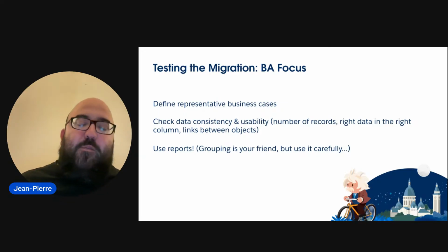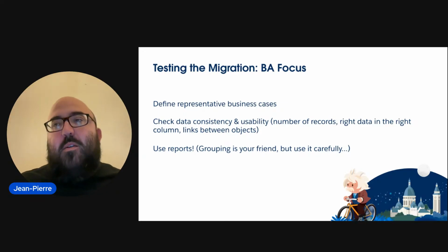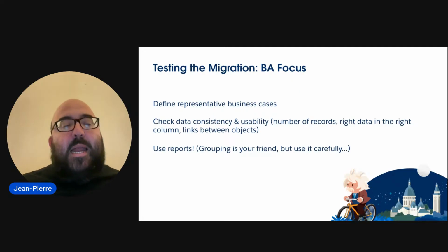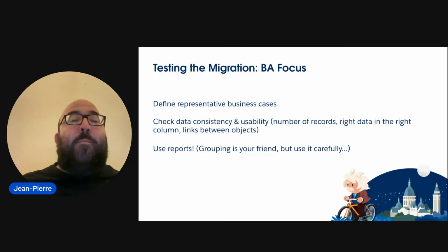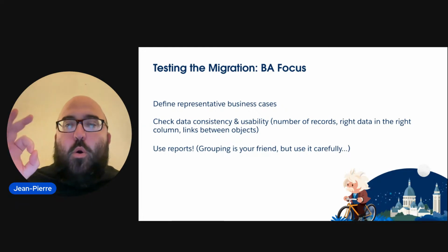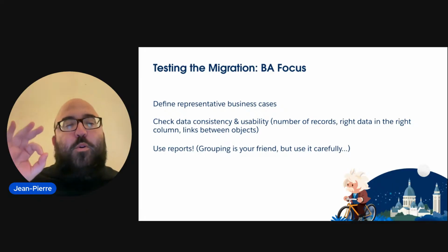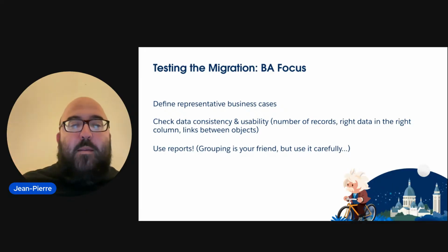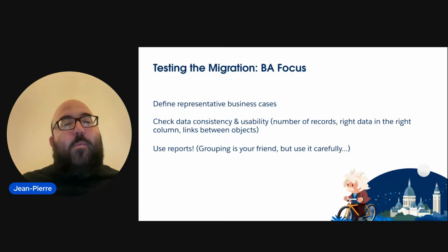And I had drafted the reports to check live with my developer the opportunities being imported. And I could see that I had 100% success rate, but I had €0 value in my opportunities, zero pipeline, no value, so unusable at all.